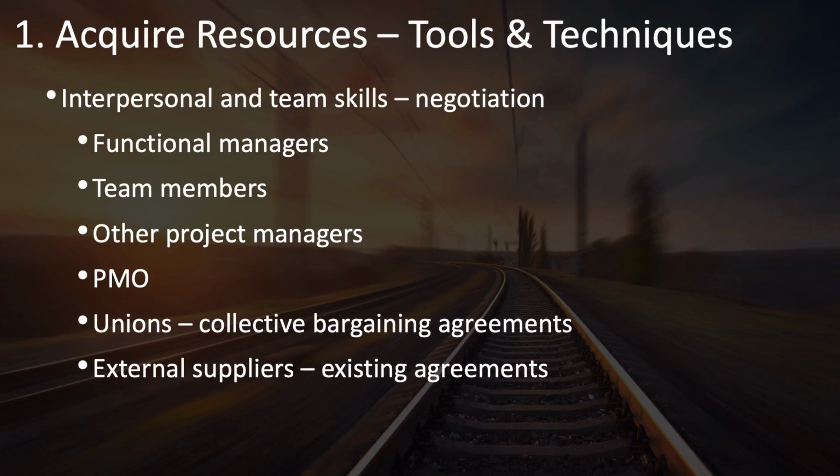In another case, in working on a large project for a university, there were several subject matter experts scattered across multiple departments within the university. And so I needed to escalate up to the group of VPs in charge and get them all to agree to make all of these subject matter experts available when we needed them on the project, which also required that I put together a plan that detailed how many hours we would need each week from each of these subject matter experts.